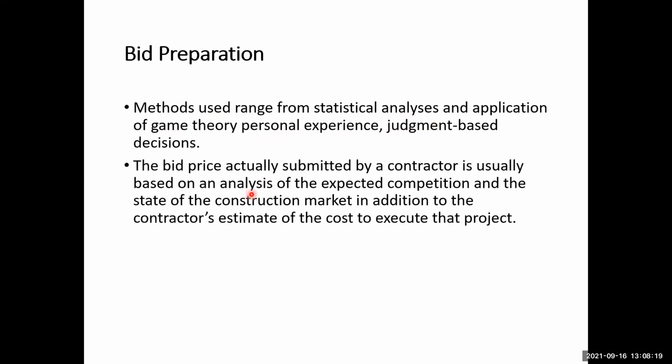The bid price actually submitted by a contractor is usually based on an analysis of the expected competition and the state of the construction market, in addition to the contractor's estimate of the cost to execute the project. Now that you have estimated your price, depending on various circumstances, it may or may not be very attractive to bid.